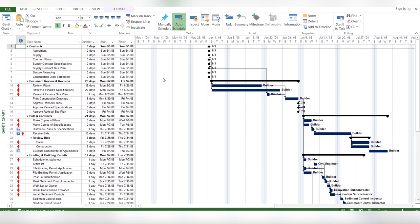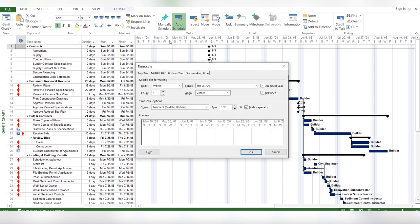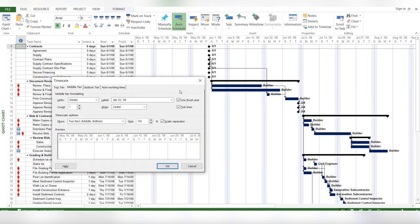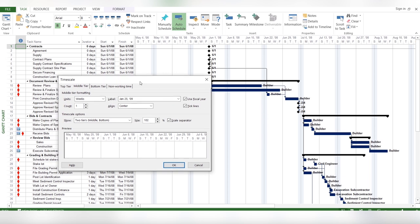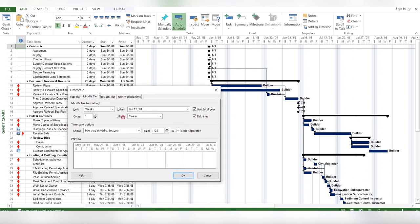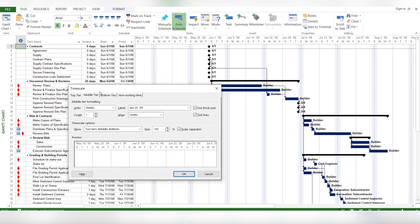Now I will print out with the settings. First, with the very first setting, I will change the timescale and I will try to compress or shrink it so that I get the whole Gantt chart correctly. Normally with the default settings, we see here the two tiers - middle tier and the bottom tier - but we can change into three tiers.